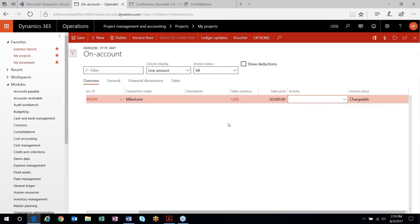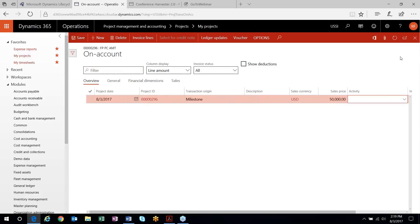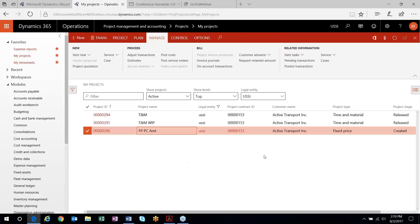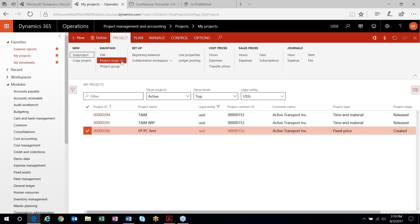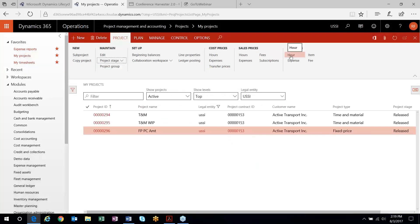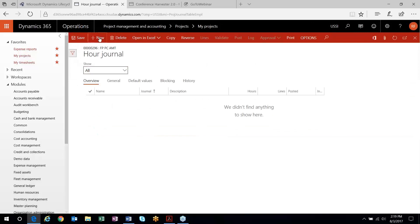D365 looks at your on-account transactions to determine what your revenue on the project is going to be. I'm going to put $50,000 in my on-account transactions. This is the amount of revenue for this fixed price project — $50,000 — and the percent complete will calculate based on that. So I have a forecast and a revenue budget on my project, and I'll turn it in process and record some hours against it.